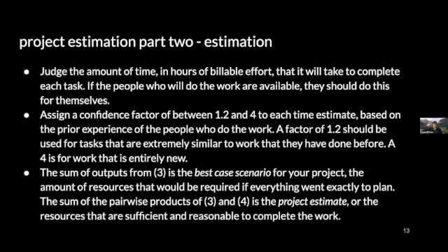The sum of the pairwise estimates, so if it's 10 hours with a 2 scale factor, you have 20 hours. The sum of those is what I call the estimate. That is the project estimate. If all the steps prior to it were done correctly, it is the amount of hours, therefore money and resources, that is both reasonable and sufficient to achieve the vision and scope.